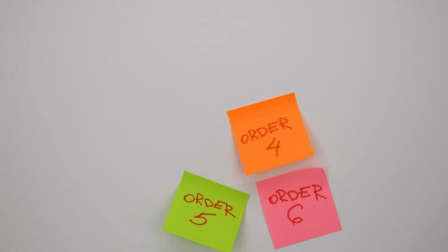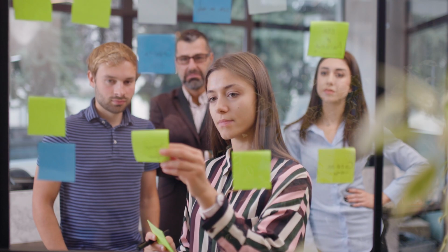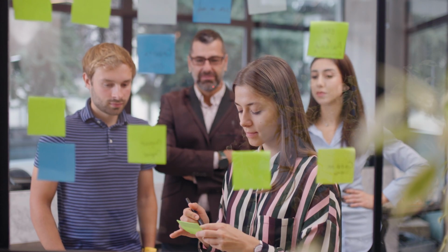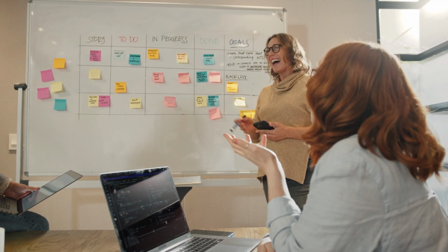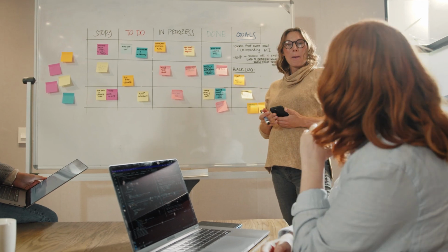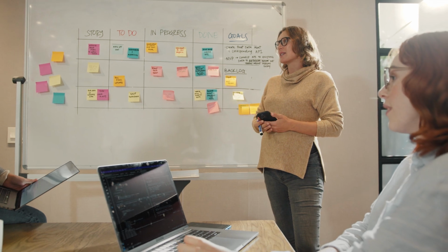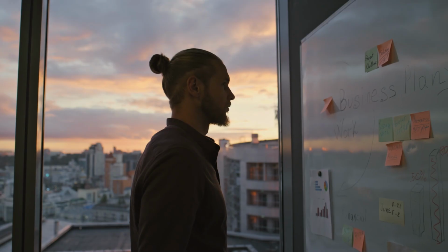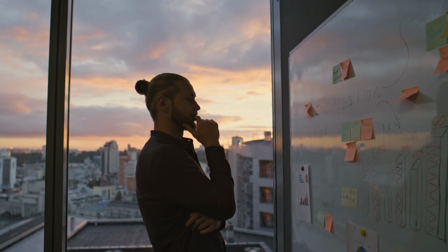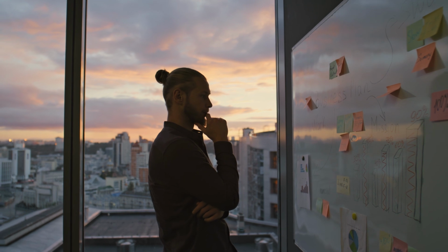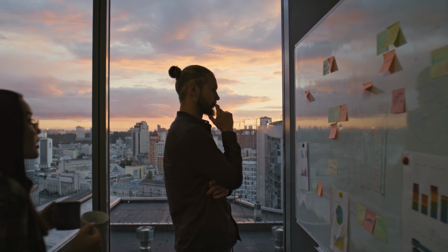I worked with a team using VersionOne, Rally, or Jira, and we started seeing their cycle times slowly rise. At first, nobody could really put their finger on why. But when we dug into the data, it turned out the deployment handoff was the culprit. That insight led to a process change, and suddenly things started moving again. Another big win, forecasting. By looking at your average cycle time, you can actually predict how long similar work items might take in the future. That's gold for sprint planning or when stakeholders come knocking, asking, hey, when's this going to be done?